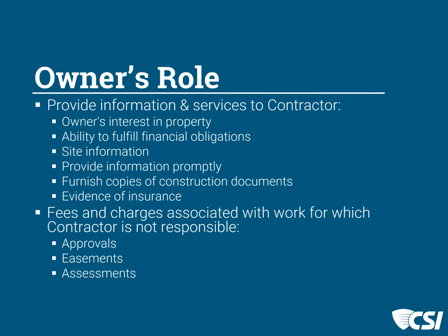So in the owner's role, first of all, their obligation is for information and any services that might be important, and it's accurate information that we need. Do you own the property? Have you got the ability to pay me? Is the site information solid? And get this to me as soon as you can. I want to know that you're insured like you should be, and give me my documents, and then we can go to work.